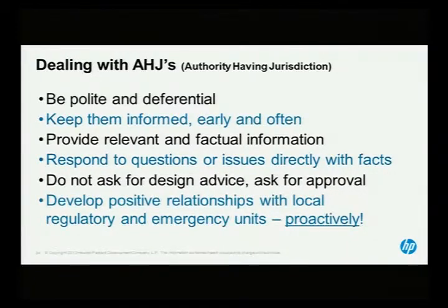So a couple of things. Be polite and deferential. They're trying to do their job. Keep them informed early and often. If you're going into an area, the argument I like to make with the AHJs is when we're building a big data center, we go to the local municipal authorities and we say, we're building a data center in your area. This is a huge, big tax increase for your grand list. There's going to be a lot of value in the computers, a lot of value there. We need to work with your building department. This is what we're intending to do. Cool. Glad to have you.